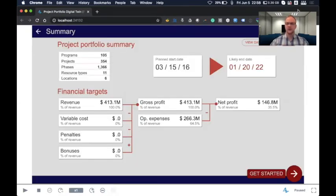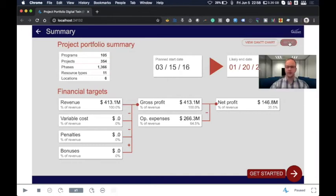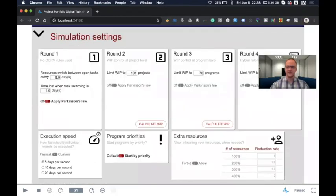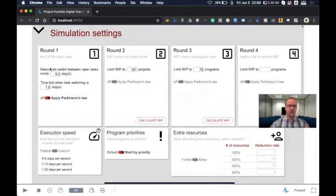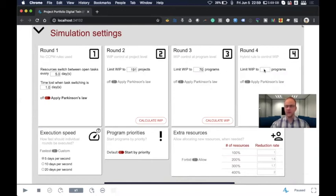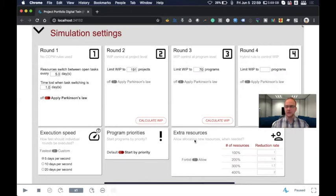Once we've viewed the Gantt chart, we are also able to view some additional parameters that you can set up per round. For round one, we can define the days that resources work on a specific task before switching and what days are lost, and also apply Parkinson's Law, which Alan will discuss in more detail later. We can set the WIP limits for specific rounds — for projects, programs, or for round four, the hybrid rule. We can also calculate these, and you can define execution speed using program priorities and whether or not you're going to allocate additional resources.